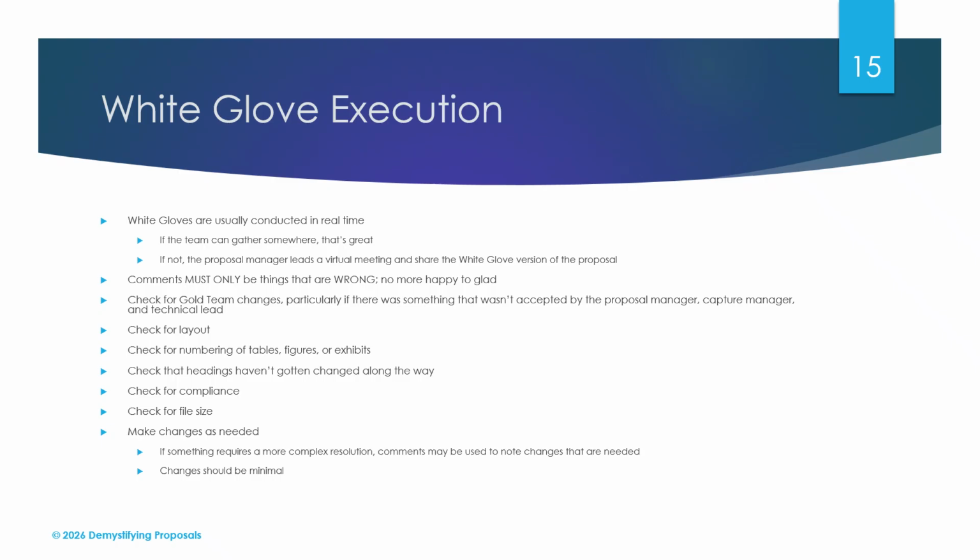At this point, comments really have to be only things that are absolutely wrong. So there's a bad page break. There's a graphic that moved and it's not in the right place anymore. Your graphics aren't numbered consecutively anymore because you took out a graphic and you forgot to renumber the other graphics, something like that. Those are the only things that you should be changing at this point. You should not be doing anything substantial.